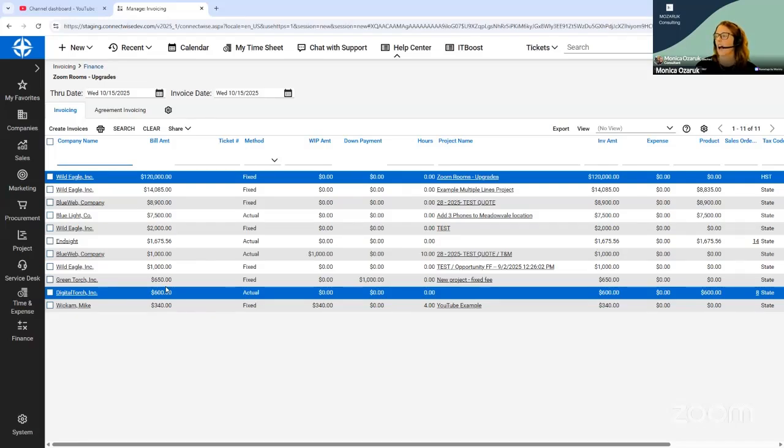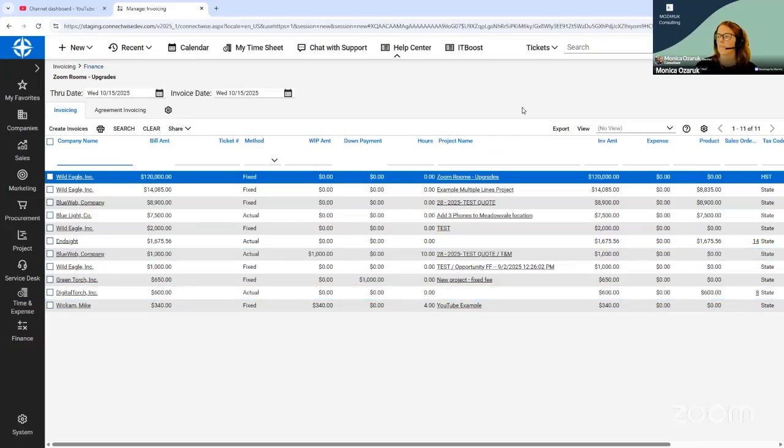As such, I recommend keeping an eye on your projects and making sure that you are billing them on a regular cadence. My most mature MSP, security, and Pro AV clients bill every project every month. So they look at every single one of their projects. They have a meeting with project managers, finance, even sales, and they say, what percentage of this project can we bill? What revenue can we recognize to make sure that we are realizing revenue as we go through this?